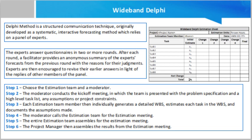Step 5.6 — the moderator collects the changed estimates from all team members and plots them on the round two line. In this round, the range will be narrower compared to the earlier one, as it is more consensus-based. Step 5.7 — the team then discusses the task modifications they have made and the assumptions.